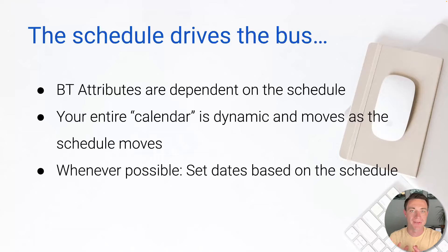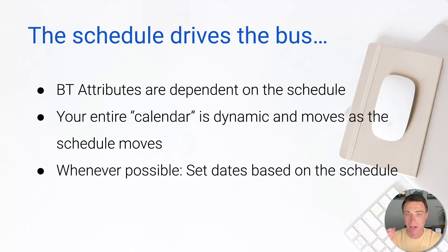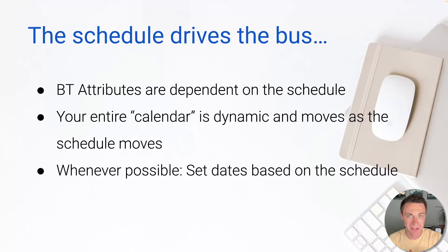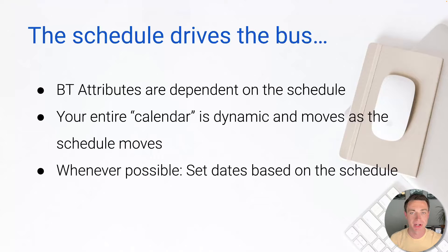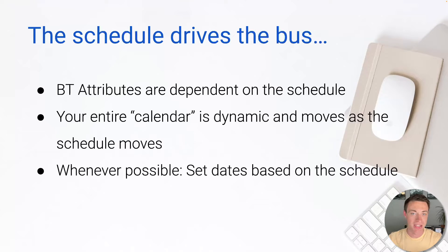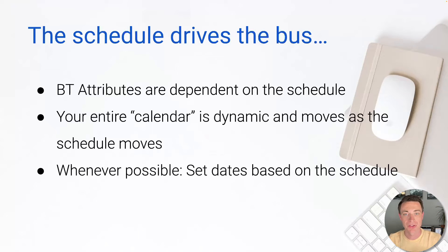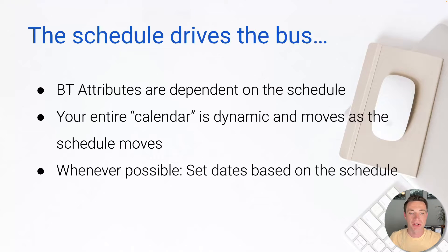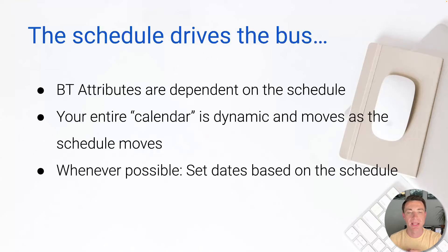So the schedule drives the bus. It is the central core part. That's obviously why I started with it. Quick win, it's easy to kind of do and intuitively understand. The attributes within BT are dependent on the schedule. What do I mean by attributes? That's to-dos, that's selections, that's invoices, various different things that we can tie to the schedule. As the schedule moves, these items move as well. Your entire calendar of how we do everything, not just production, is dynamic and it moves as our schedule moves.